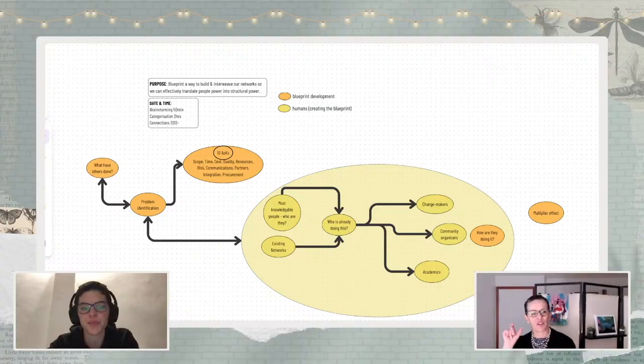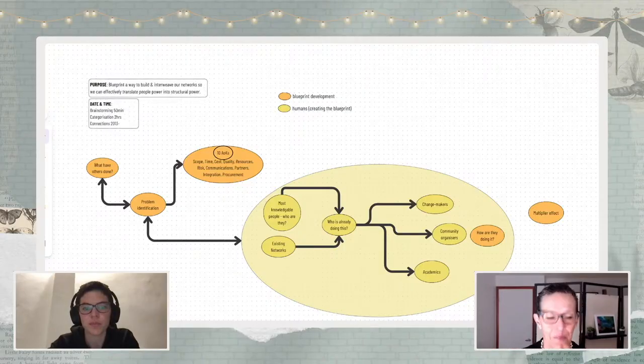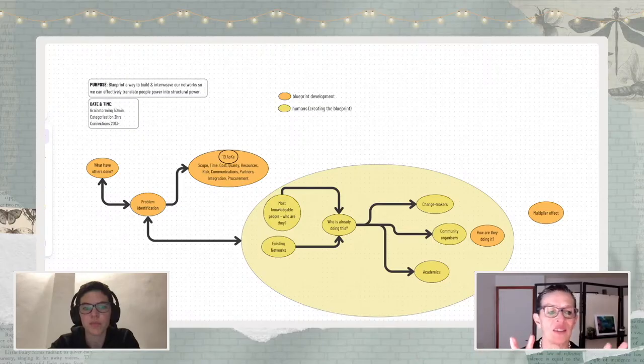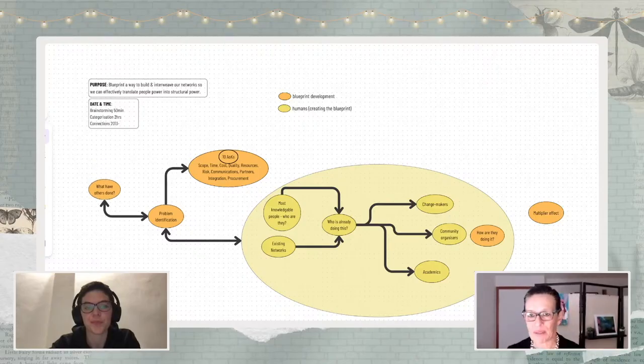Yeah, and just as a bit of theory behind this: no bubble can be without connection, because then what is it doing there? When we find that, that's when we see we have a gap. We have something that is happening, but it's not connected, or it has a beginning and no end.